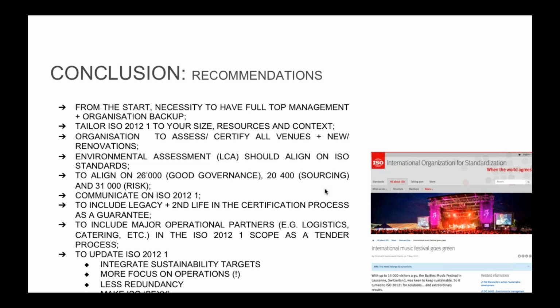A lot of ISO 20121 events have been certified before the kickoff of the event. Why? They were assessed on the project management side, and then during the event they were being audited, but that was more to look if what they had promised would be accomplished. I would really recommend to put yourself under the challenge of really certifying your project management plus your operations. Why? Because you can promise, you can put on paper, but nothing replaces reality.